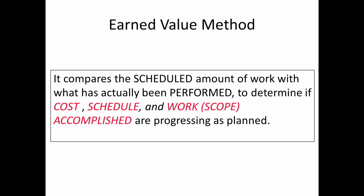Moving forward, the earned value method is quite comprehensive, quite popular, and very powerful because we are able to monitor based on the amount of work which has actually been performed. It is not based on money spent or man-hours spent — it is on what is actually done. It integrates cost, schedule, and work scope into a metric that gives an idea of how the project is performing.